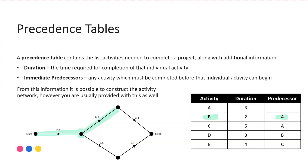It is the activity that leads into the vertex from which B commences or B starts. So we can see there as well for activity C, activity A is also an immediate predecessor. Looking at the other activities there, activity E has activity C as a predecessor. So we can see here activity E, looking at the vertex from which E starts, that means activity C must finish at that point. So that's telling us that I can't do activity E until C is finished.